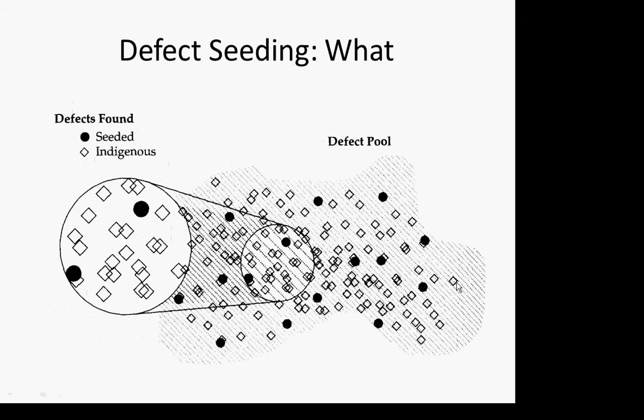So here we've got some defects and some tag defects. And the proposal here, ladies and gentlemen, and this is done in real projects, is you actually seed defects. You introduce defects into your project, temporarily, of course. And you record exactly where they went, precisely where those defects are placed, and you put them in there.